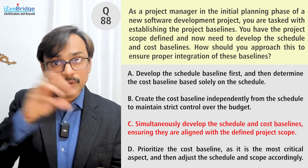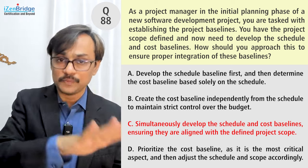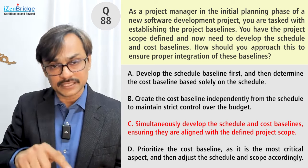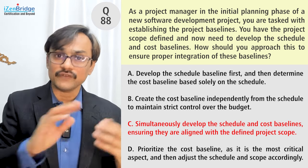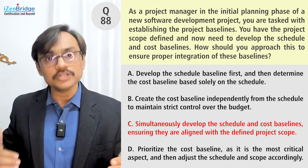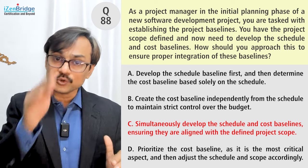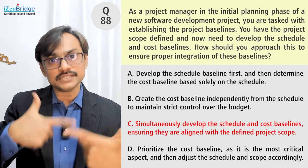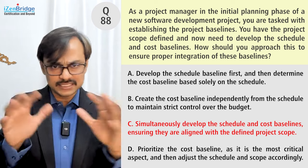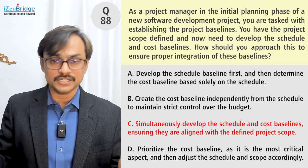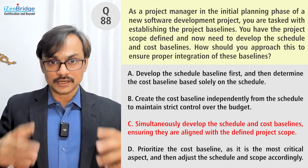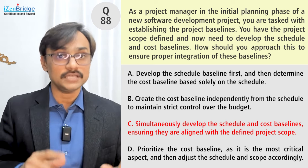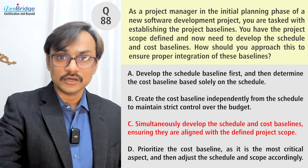We go through multiple iterations because scheduling, resourcing, and costing are interrelated — and even risk management is interrelated. If I'm planning to mitigate a risk, I need to plan those activities, contingencies, time, and money. Fast-tracking and crashing decisions impact costing. Resource leveling also impacts costing. All these are developed iteratively, and once there's agreement on all parameters, you can baseline the schedule and cost.